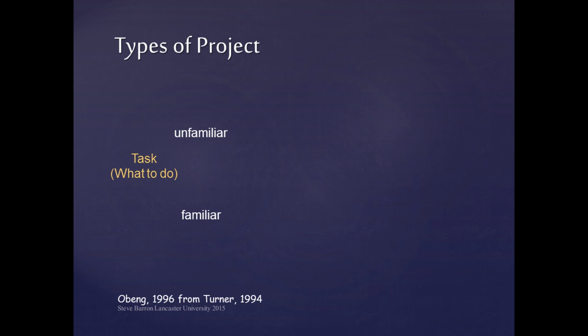If the task is unfamiliar, then this suggests that the project definition is unclear or cannot be agreed by all stakeholders. In this case, the management focus will be on clarifying and agreeing project requirements in order to define the project purpose and objectives.